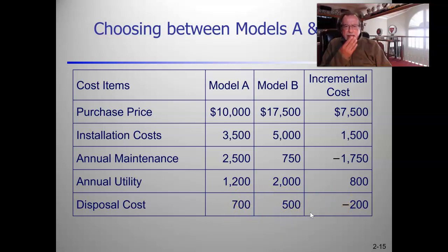The reason I say that is because most projects have not adequately evaluated the cost of disposal, the end of life cost, because it's uncertain, because it's so far in the future, as well as costs just change over time dramatically, many times depending upon regulatory requirements.